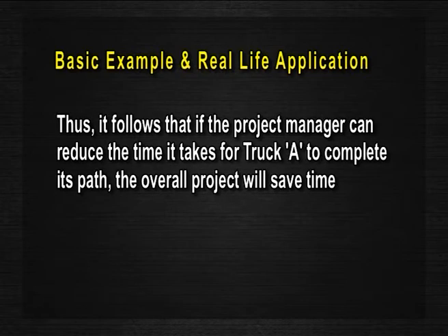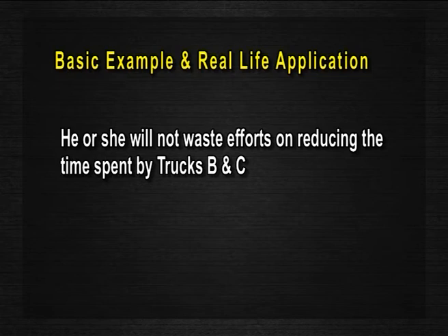Thus, it follows that if the project manager can reduce the time it takes for truck A to complete its path, the overall project will save time.